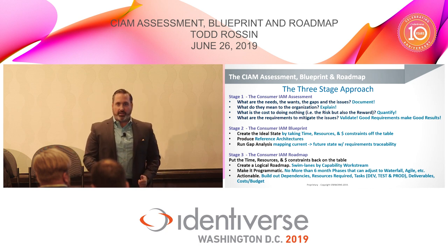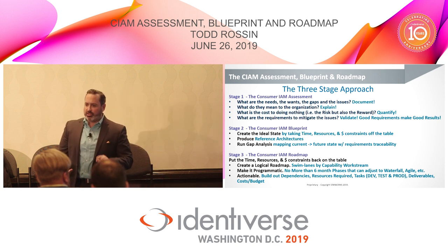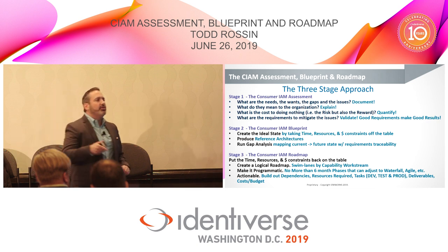Do you need a design document in it, a test plan, rollback guide if you're replacing or cutover plan, administrative guides, so on and so forth? Define those. Get them out of the way. Your PMs will love you for it, your PMO. And then you can cost and budget it.